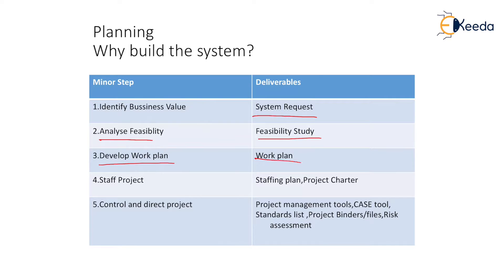In the fourth step we have to follow the staff project — like how many staffing we require, what staff we require for what department, and what type of skills that staff should have. And fifth is control and direct the project. For that we have to decide like project management tools, case tools, standard list, project binder or files, and some risk assessment — like which we are going to follow. Like that we can plan at the time of the planning stage.